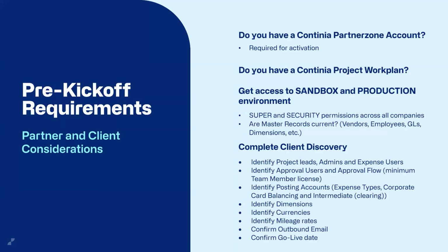It's a very robust Excel work plan document. So as a partner, you want to gain access to your client's environment, of course. You want to create a current copy of your client's production environment to create a sandbox. We suggest that you always do your testing in a sandbox environment. Everything that we've done in the sandbox could be migrated to your client's live production environment. So we want you to create a sandbox for the purpose of the implementation.